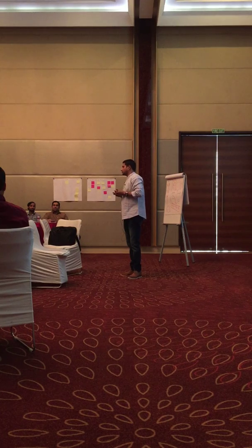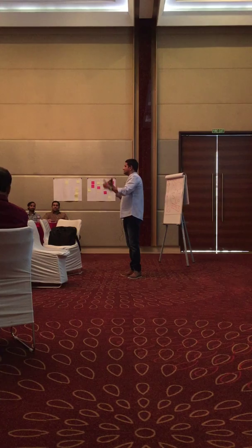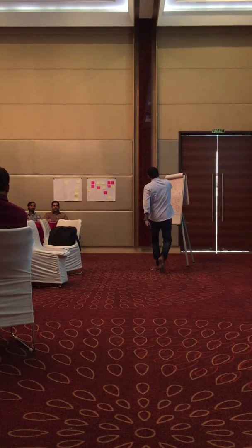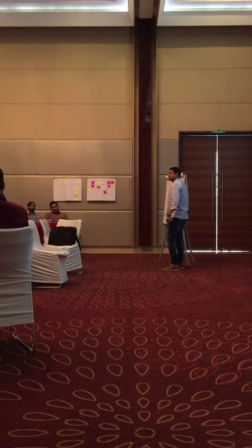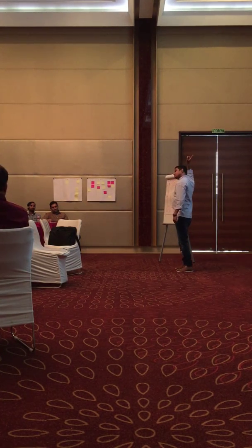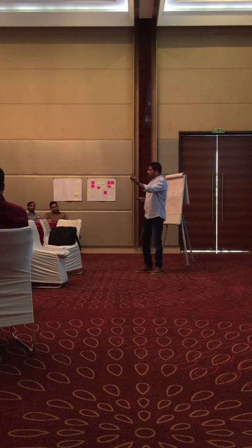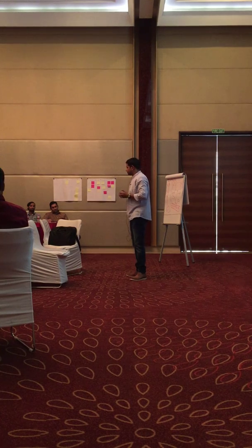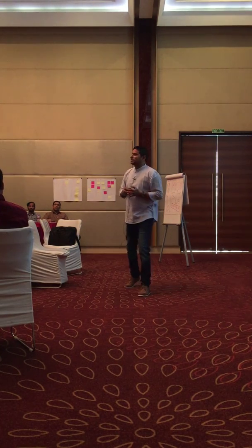The reason is it is very difficult to communicate and also balance the dependencies, right? If it is one backlog, moving from here to here is fine, and this is an ordered list. Otherwise there may be one item with order 3 here and one item with order 3 there, so it will create a lot of confusion. One team works against one backlog. Multiple teams can work on a single backlog, that is a scale model that we discuss in subsequent topics.